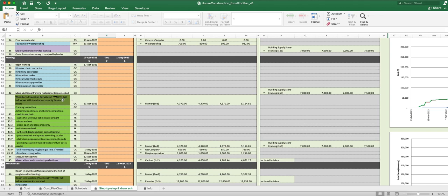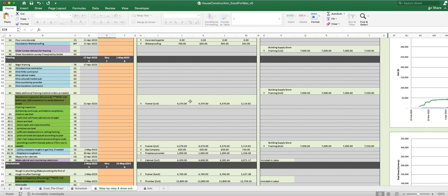Windstorm inspection, this is something that you'll have set up around 21 April. This is when you'll pay the framer the first of, normally you pay him in three payments, but he'll receive his first payment of $4370 around 21 April. Your bank is going to want to know this type of information for your draw schedule on the financing for your construction loan.